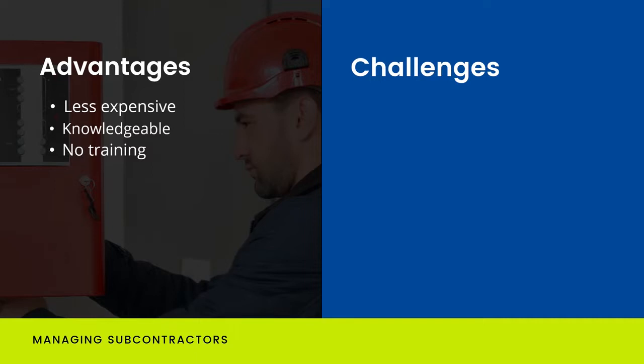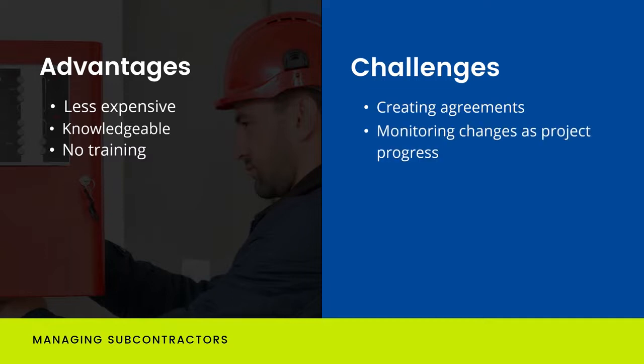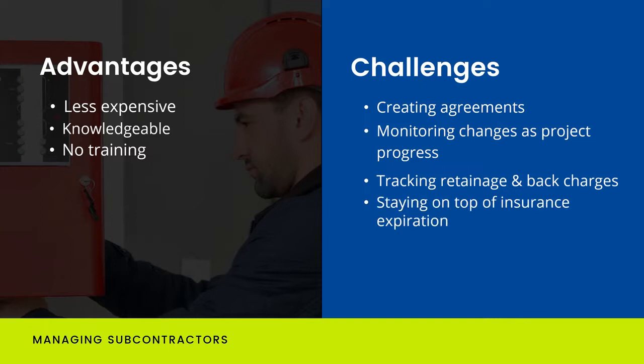There are a lot of advantages to using subcontractors, but with that being said, you need to be able to generate contracts easily and track the progress of those contracts. This includes everything from creating the original agreements, tracking changes to those agreements as the project progresses, tracking retainage withheld, and even back charges that may occur. In addition, you need to keep up with your subcontractor's insurance expiration information and be able to provide insurance audit reports with ease.